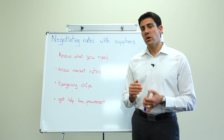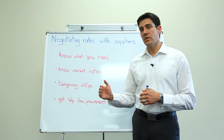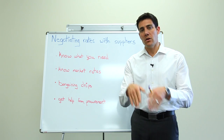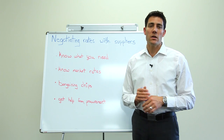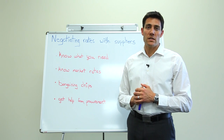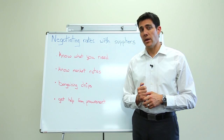Likewise, is the project work going to be contiguous so that you allow your supplier some good continuity on your resources and allows them to plan over time? Or is it going to be staccato, a week here, a week there, and maybe a week, a month from now? If you've got longer contiguous work, you're definitely in the running for having a better, lower rate from your consulting organization or your contracting body. Staccato work always gets the higher rates.